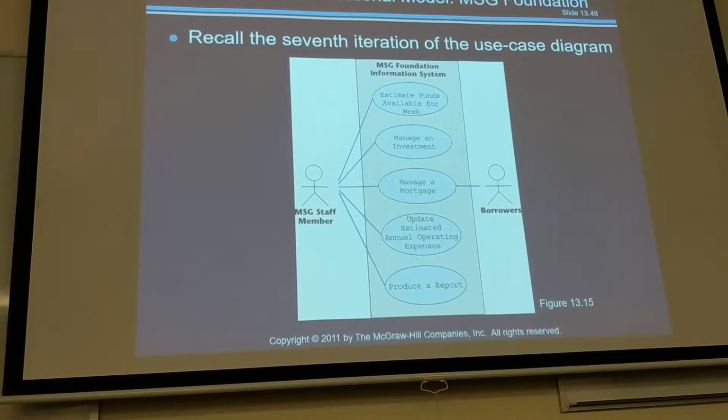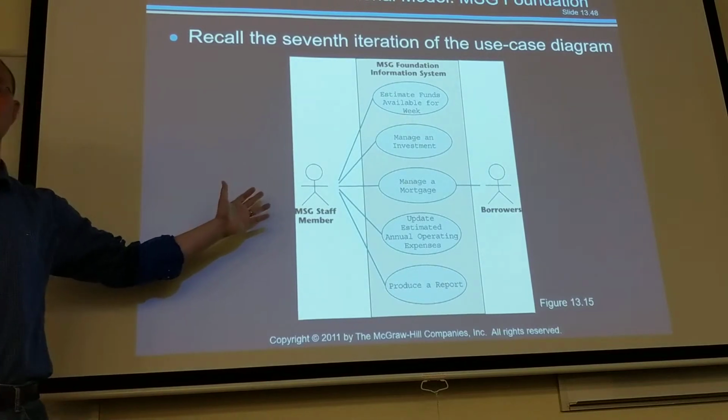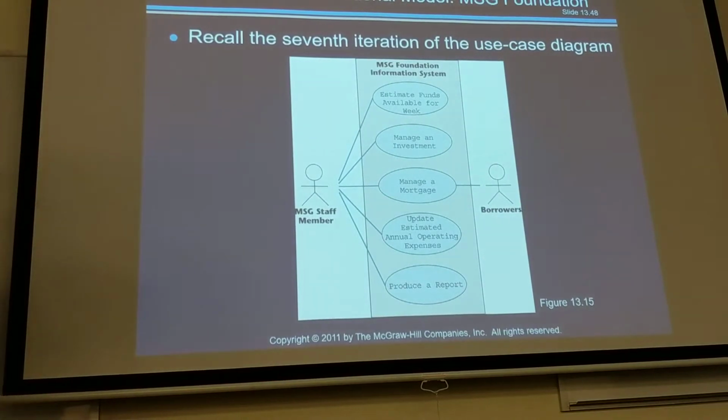Once you sign a contract to build a house with a contractor, if you make any change, you basically have to provide an addendum to your contract. Essentially you are entering a new round of negotiation with your contractor to see whether you can add a new feature or not. Typically, adding a new feature means that you have to pay more money. Which is not always true in our case, because it's software. Your user has the expectation that if it's not a major change according to them, you should be able to accommodate those changes.